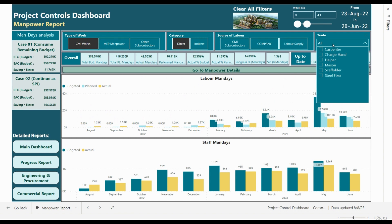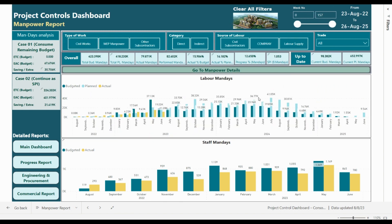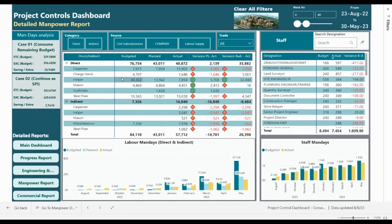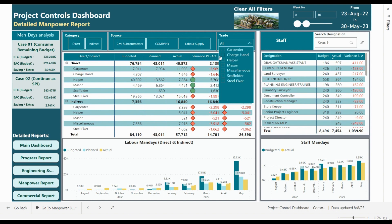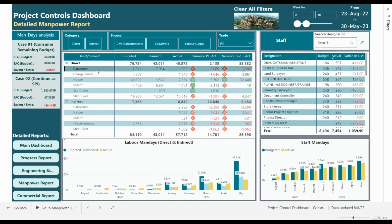You can also analyze based on the trade of the manpower — carpenter, charge hand, helper, mason, etc. We will clear all the filters. In this table we are presenting the direct and indirect manpower and their subcategories, with a comparison of budgeted, planned, and actual with the variance. You can filter based on one trade, for example carpenter, from the filter or by directly clicking on carpenter and all the dashboard will interact with your selection.